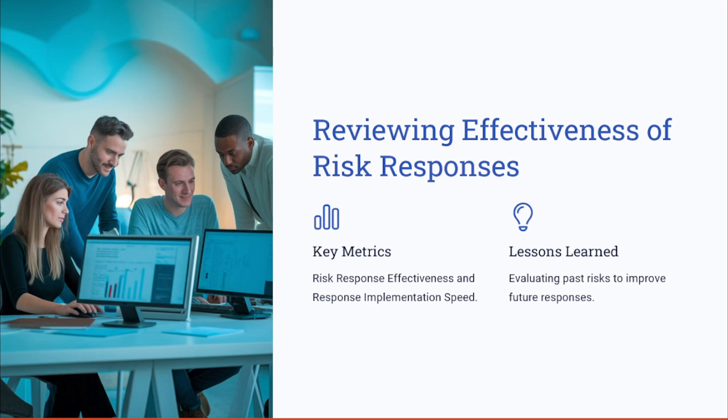And the other tool here is the lessons learned. Lessons learned is used to evaluate the past risks to improve the future responses. Let's take an example of an IT project that used the performance metric to assess the risk response effectiveness by analyzing the past incidents and looking at the previous lessons learned from the other projects. By doing that, they improved the system redundancy and reduced the downtime by a percent.